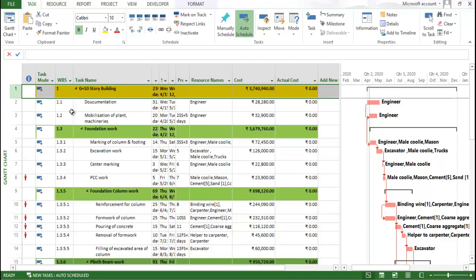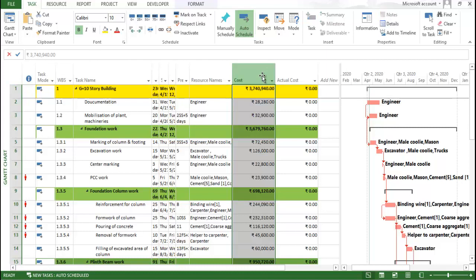So guys, you can see here we have the cost. This cost is the estimated cost which we identify from the resources. But now, what is the actual cost? Actual cost is the cost which is incurred for the actual site. Like the documentation we budgeted 28,000 but we required only 25,000. Whatever the cost required for this particular work is only 25,000. What does it mean? It means that particular resource utilized his proper time to complete this task.